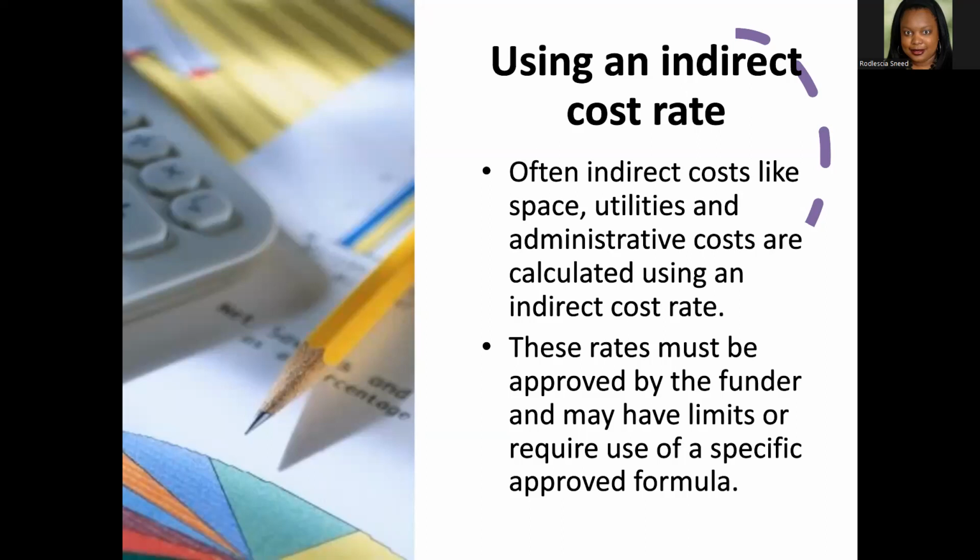So I believe Ruth Mott Foundation has like a 10% limit on the reimbursable indirect cost rate that they will allow in their grant. That means that if you've got a higher indirect cost rate, you're eating some of the costs because they're not going to fund it all. And that's a very common thing.